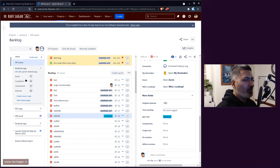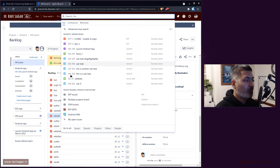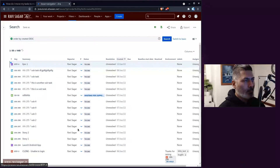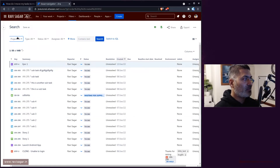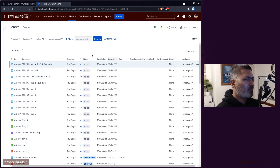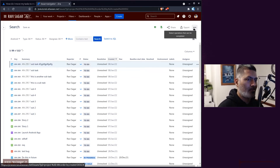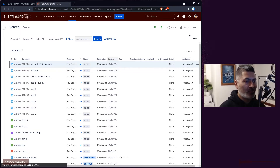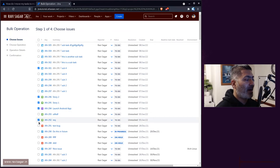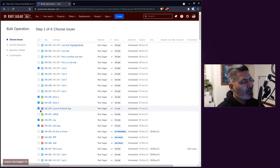You can also do this using bulk operations. Go to the Issue Navigator by going to Search and then Issues. First search for the issues you want to update — for example, select the Android project — then narrow down based on what you need. Once you have your issues, you can do a bulk change. You can select all issues or just the ones you've filtered, even across a predefined saved filter.